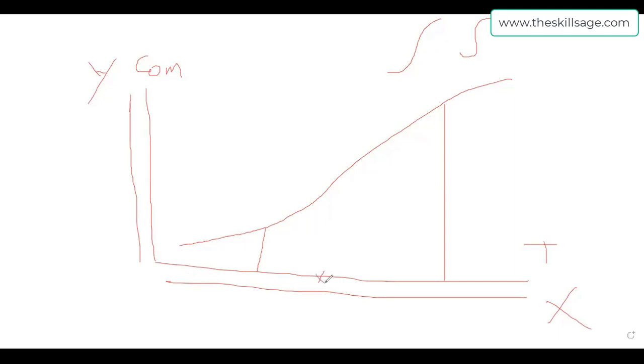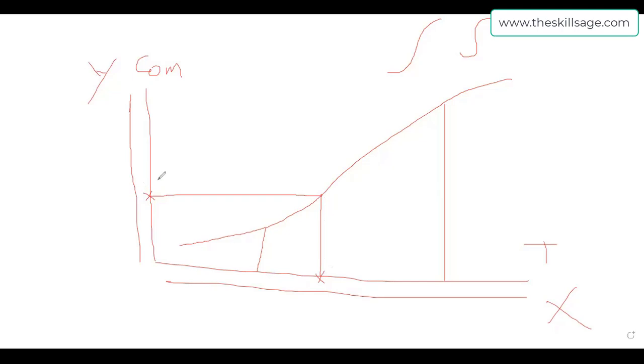This S curve helps us understand that, let's say I cut off this date—this is June 2024—and I want to see how it can help me. I can extrapolate here and it gives me a value. Till June 2024, for my project I need maybe 100 million dollars, or 100,000 man hours, or whatever you have plotted along the Y-axis. That's how the S curve is helping me out.